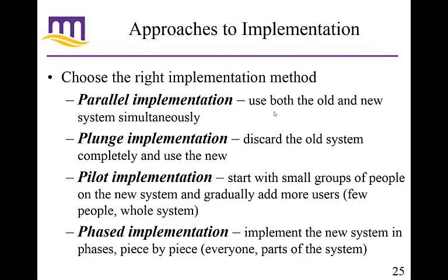All right, the dangerous one is the plunge implementation, and it is usually more often used for small pieces of software rather than larger ones. The pilot is a popular one because that way a few people are using it. If it goes wrong for a few people, usually it doesn't destroy the entire company, right? And so it's something that you can easily identify and fix. You gradually add more users until you just cut off and everyone starts using it.